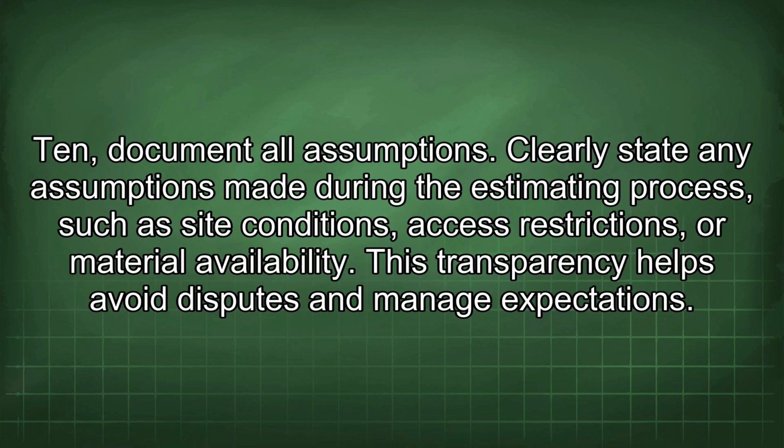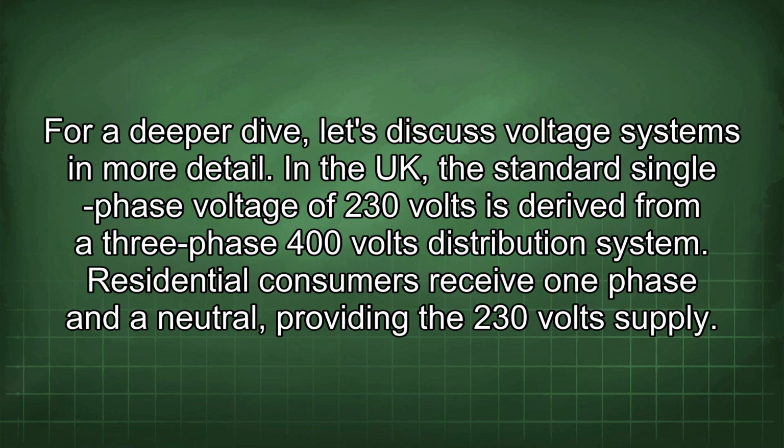10. Document all assumptions. Clearly state any assumptions made during the estimating process, such as site conditions, access restrictions, or material availability. This transparency helps avoid disputes and manage expectations. For a deeper dive, let's discuss voltage systems in more detail.